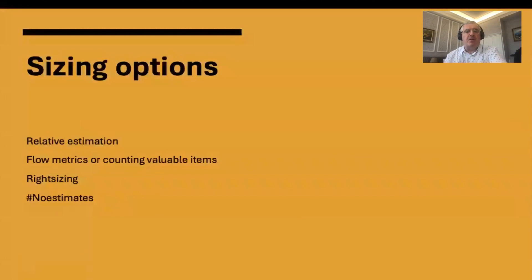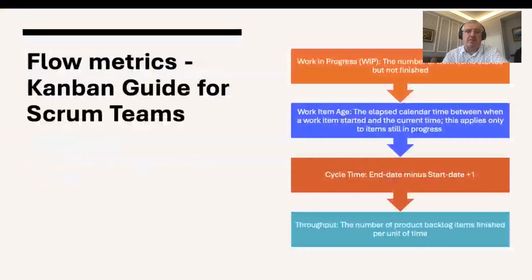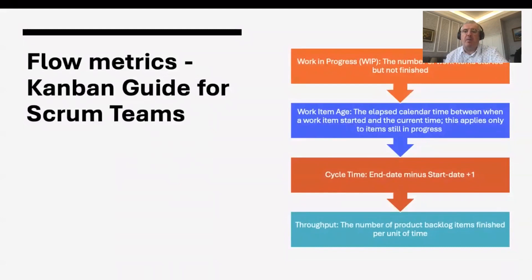Some options include relative estimation, flow metrics, counting valuable items, mixing flow metrics with item counting, right-sizing, and no estimates. In the Kanban Guide for Scrum Teams, there are four flow metrics: work in progress (items started but not finished), work item age (how old an item is since it started), cycle time (end date minus start date plus one), and throughput (the number of items delivered in a given period).